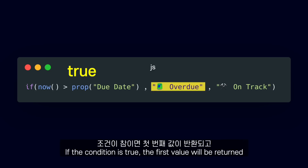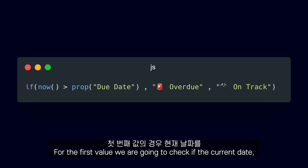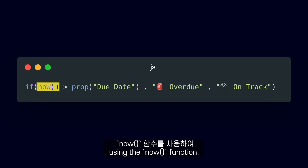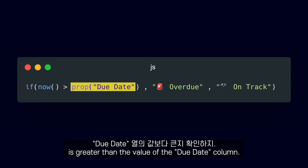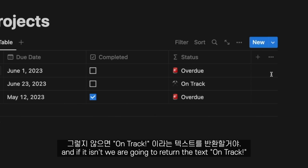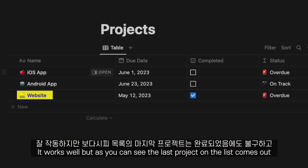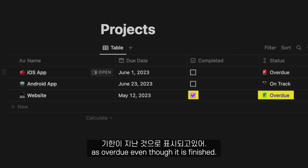The if function takes a condition and two values. If the condition is true, the first value will be returned, and if it isn't, the second one will be. For the first value, we are going to check if the current date using the now function is greater than the value of the due date column. If it is, we are going to return the text 'overdue', and if it isn't, we are going to return the text 'on track'. It works well, but as you can see, the last project on the list comes out as overdue, even though it is finished.